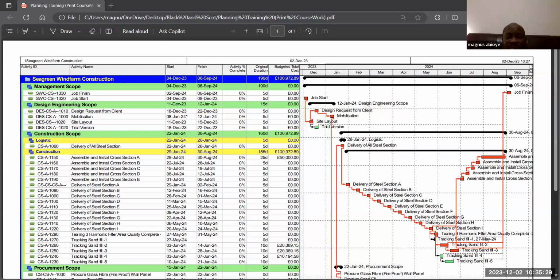So once you delete B, you have to go to A and look for what to link A to as its successor, and go to C and click on what to link C to as its predecessor. And that's the difference. The advantage is that you can undo it, but there is a limit to the undo because after a long time, that command remains almost permanent.